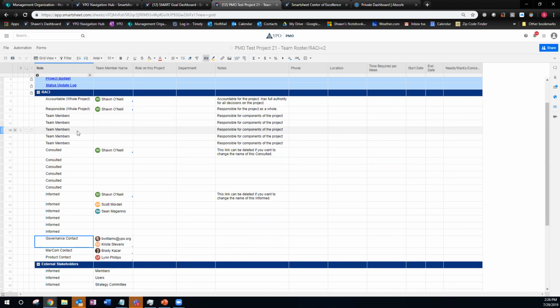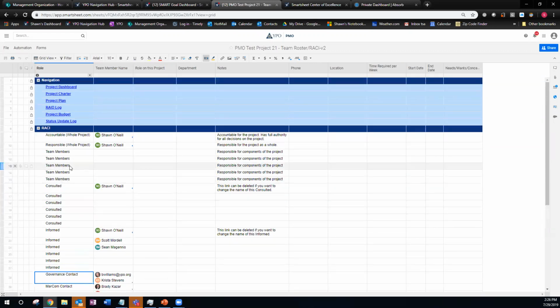So the first step in any project that you do, if you ever study project management, is identify all the stakeholders. Probably one of the most important parts of any project. Finding out who your stakeholders are late in the project can be disastrous because they may have requirements or needs that you didn't account for, and can just mess everything up. So anyhow, that's what this is.